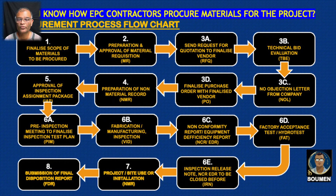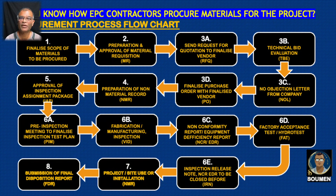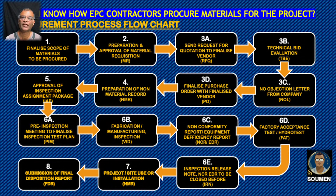From this key design drawing, the issued-for-construction drawing will be prepared. When the drawings are almost at the final stage, in parallel, material specialists from the company decide the final scope of material to be procured. Some project materials are supplied by the company itself. For pipeline, it is very popular that line pipes are all supplied by the company. Some special alloying materials — like Incoloy or stainless steel — sometimes companies supply as fittings, pipe, and the contractor fabricates them, or sometimes even completed spools are provided, especially in onshore wellhead and flow line related projects.